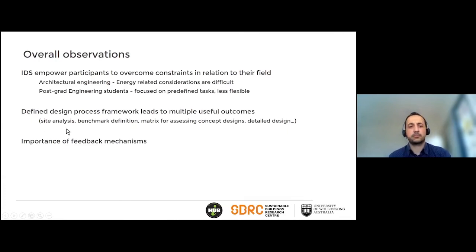Give them that orderly process of site analysis, return brief, develop a benchmark, develop a matrix for idea generation and filtering, and then move into the detailed design. That seemed to be a very useful thing to do. And of course, continuous feedback from the client and the consultants was extremely valuable. And I will close here.